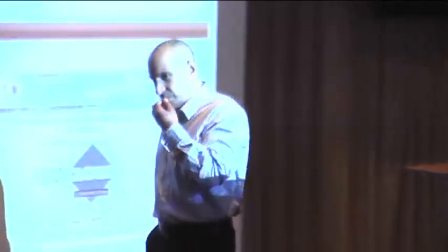Okay. There was another hand question. Anything else? Cliff, is the system suitable for refurbishing existing buildings? From a feasibility point of view, or from a costing point of view? Remember, it's not a costing program. It's not an estimating system. So, yes, your input cost is your land and existing building. You have a capital cost of refurbishment, you have all the other costs of professional fees, your legal costs, your tenant costs, your insurance costs.